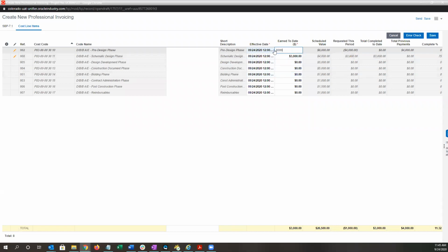So let's put this back to 8,000. Okay, so we've earned 11,000 to date. Requested this period is 7,000 because we paid 4,000 previously. Overall, we're at 41% complete. I'll go ahead and click save.